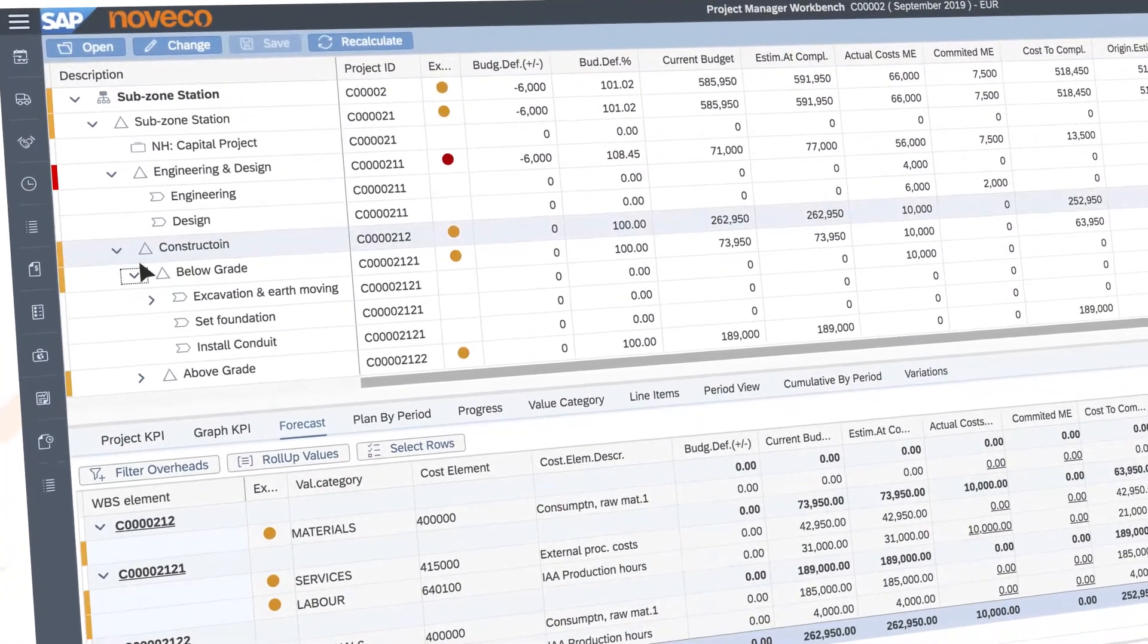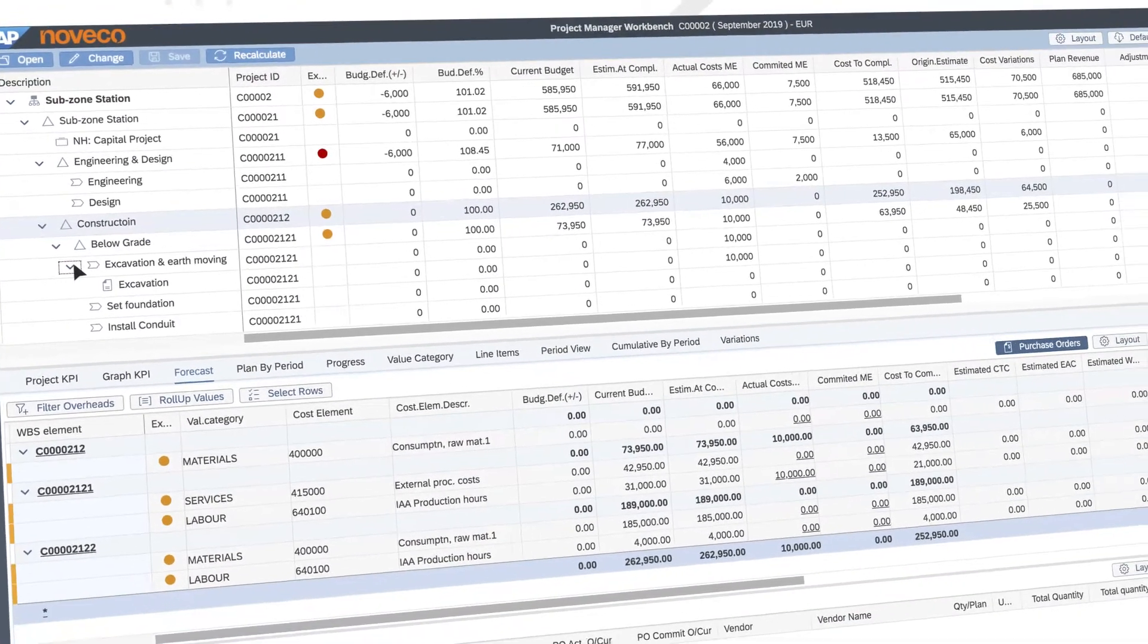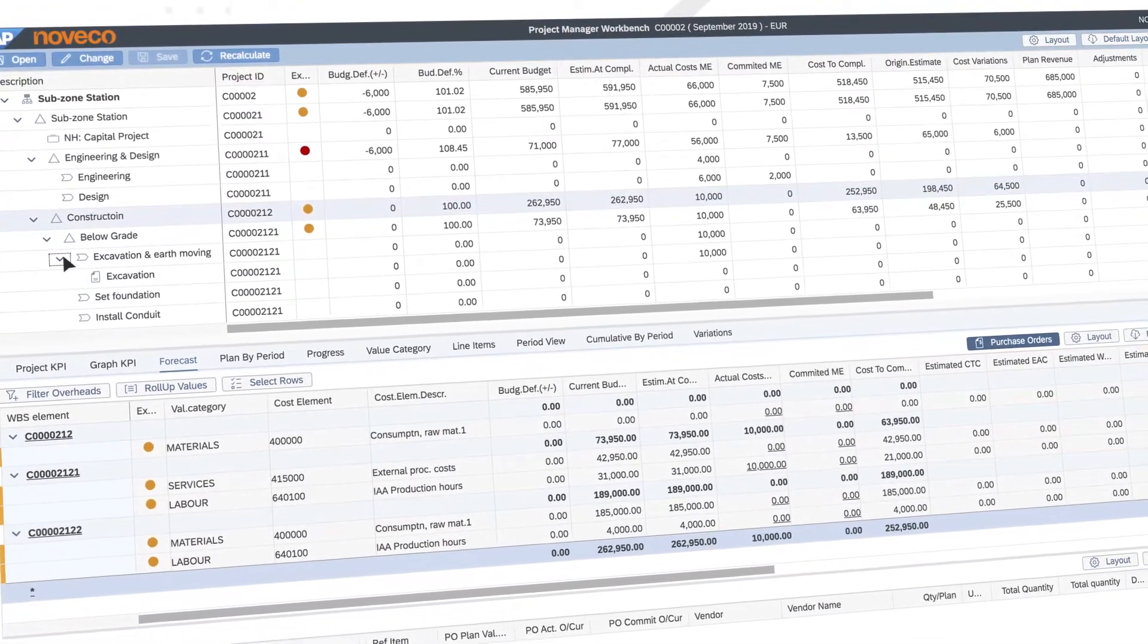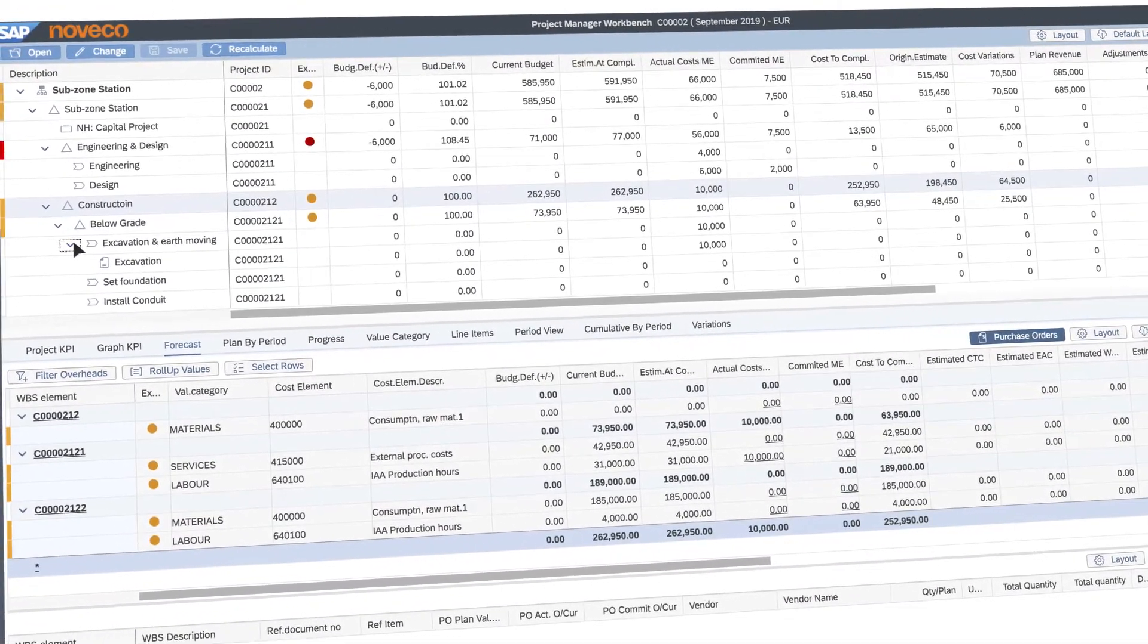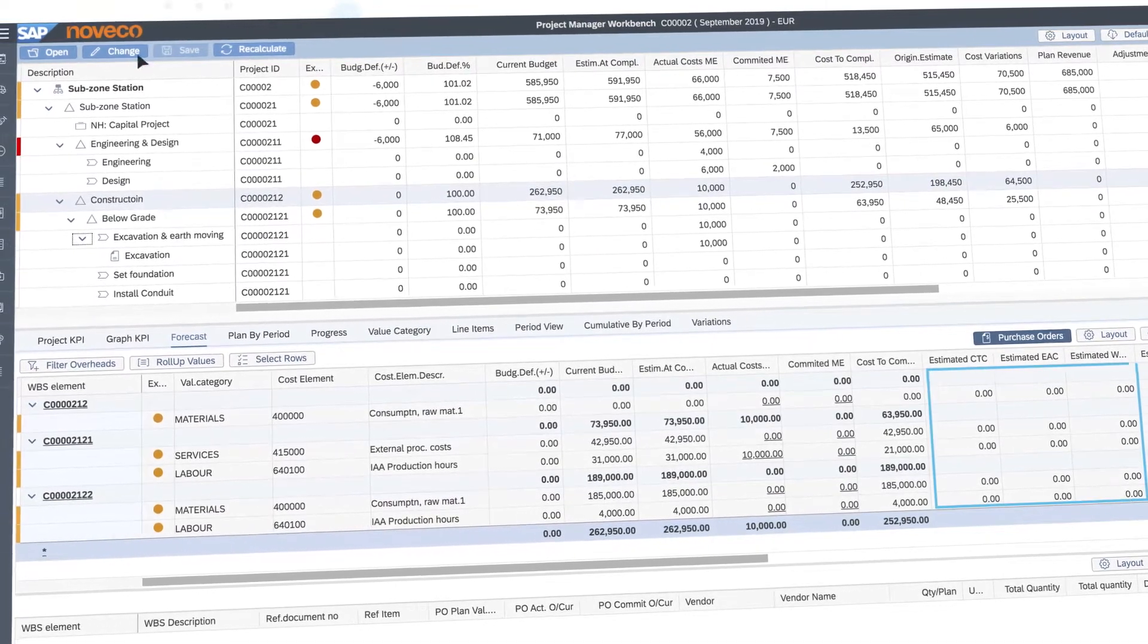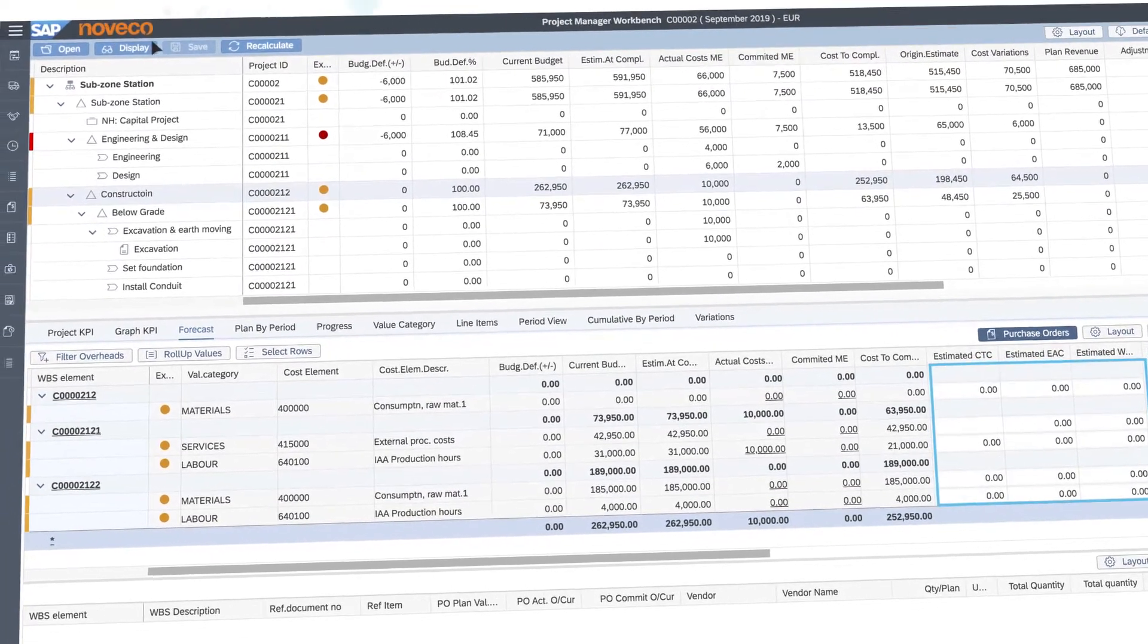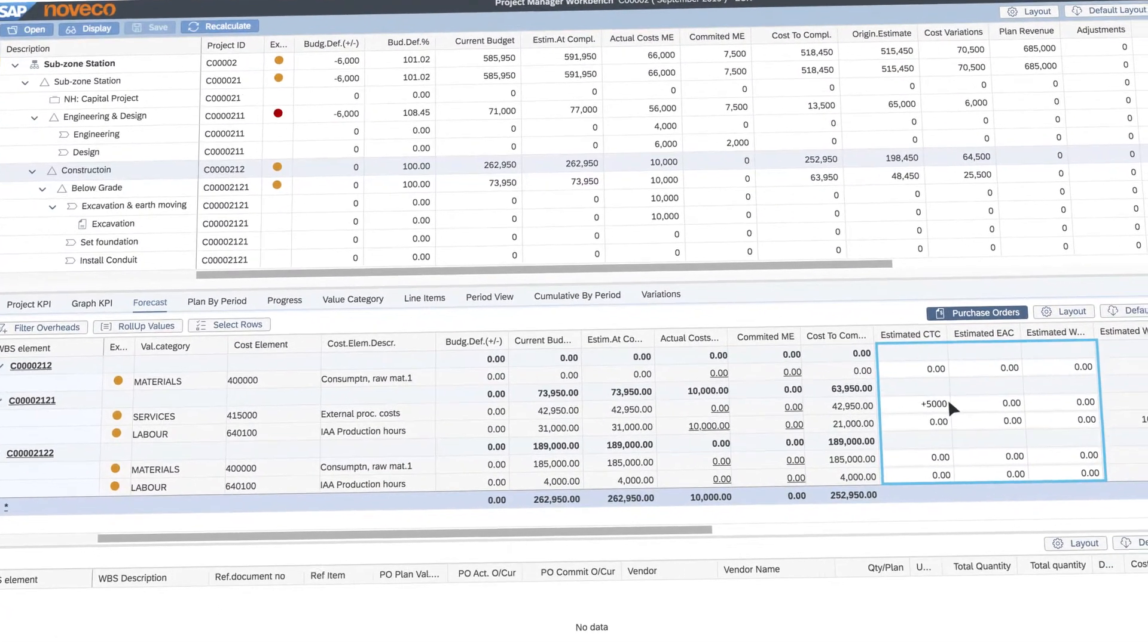Integrating actual costs and purchase commitments from WBS elements, networks, maintenance and production orders in real-time. You can manually adjust forecasts where needed.